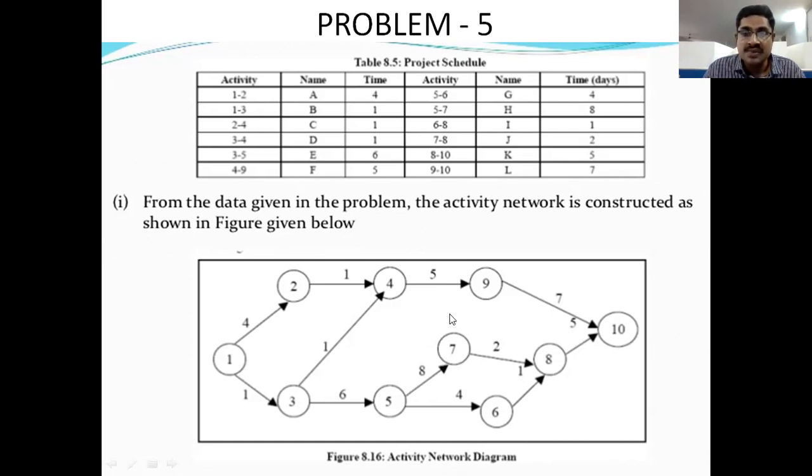Right. Next thing, now 5 to 7 is done. Next 6 to 8 and 7 to 8. So here we have node 6 and node 7. Just draw a circle and put the 8 marker in that node, and connect these two, 6 to 8 and 7 to 8. So this 8 came from 7 and 6. In this particular part, this is all about merge activity. And the earlier part is called burst activity.